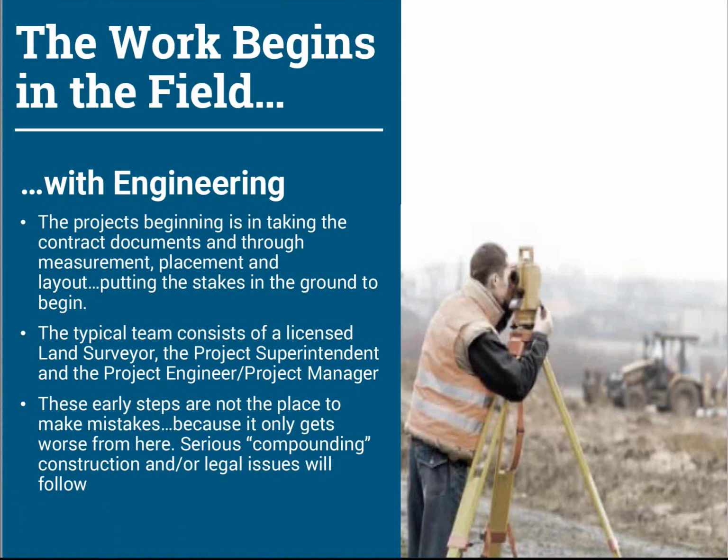We have surveys that have typically been provided by the owner, and we're laying out the project, which usually involves surveyors, the project superintendent or project engineer, perhaps a project manager, getting things laid out in the right place. And it's really important to focus here on getting in the right place, because as everyone knows, from this point forward, any kind of a serious issue is going to have a compounding effect on the project and could start us off in a real mess.